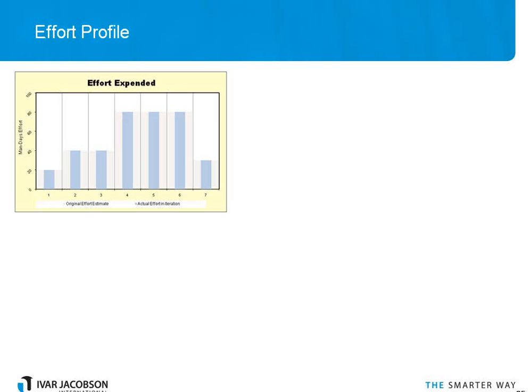Okay, so we've looked at a number now. The final one I'd like to look at in some detail is the effort profile. Now, a lot of agile software and iterative projects are quite small teams. They often own an application, they get a budget for a year, and they're going to spend that budget, which is directly proportional to effort. So they tend to be doing the cost reporting separately, but the thing we can control most within the project is how much effort we're going to do. And we need to keep looking at this on an iteration by iteration basis.